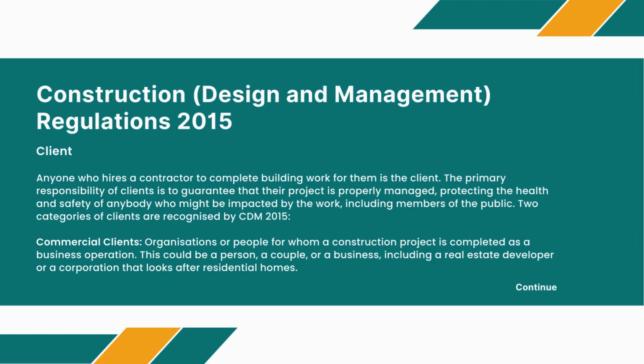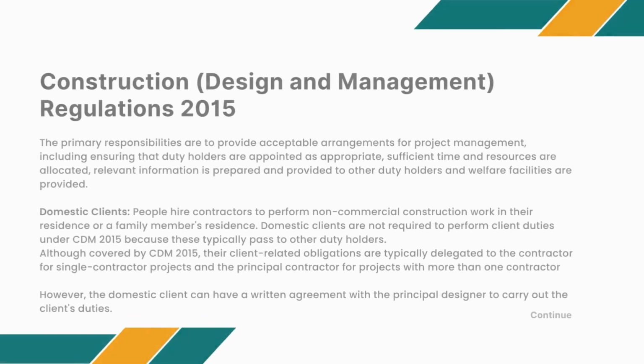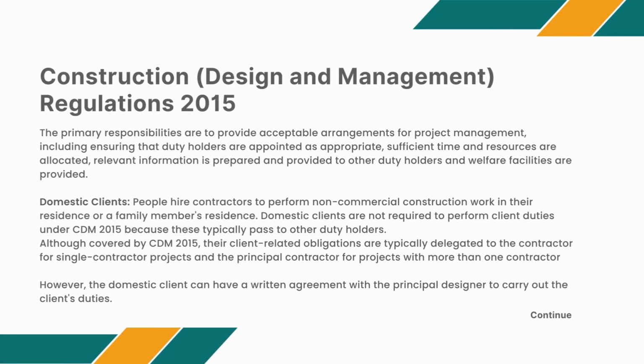Commercial clients: organizations or people for whom a construction project is completed as a business operation. This could be a person, a couple, or a business, including a real estate developer or a corporation that looks after residential homes. The primary responsibilities are to provide acceptable arrangements for project management, including ensuring that duty holders are appointed as appropriate, sufficient time and resources are allocated, relevant information is prepared and provided to other duty holders, and welfare facilities are provided.